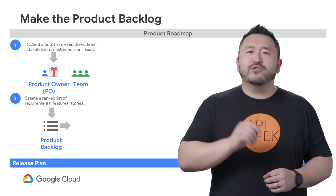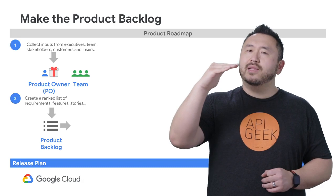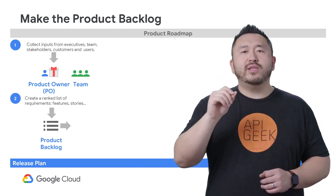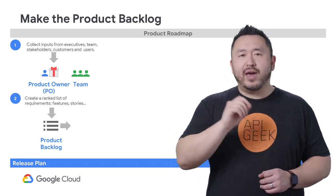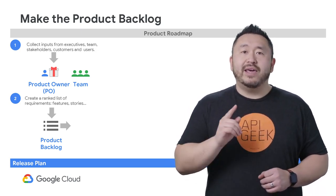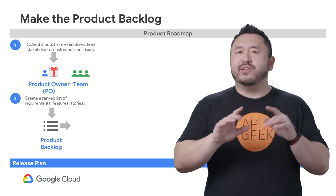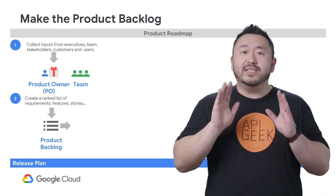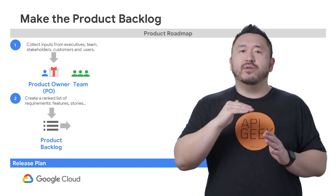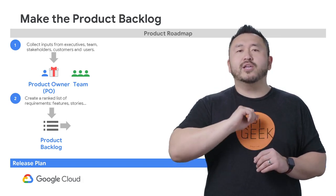Now that you have the scope of your first release, it should be quickly turned into a ranked list of requirements in step two. These requirements are written in the form of epics and user stories. Often at this point, the habit is to go into a lot of requirements detail — don't. Instead of going deep, list all the high-level features and requirements. If you're spending more than a week on this, you're likely going too deep.